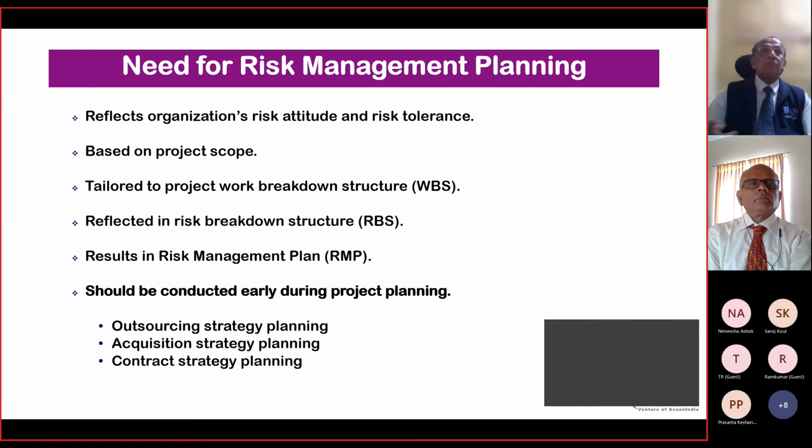workstation. Based on project scope, tailored to the project work breakdown structure. The project work has to be broken down into various levels, then reflected in risk breakdown structures, which results in the risk management plan. Now, all these things that you're seeing now are component parts and parcel of the risk management policy of the organization. Do you agree, Shyam?